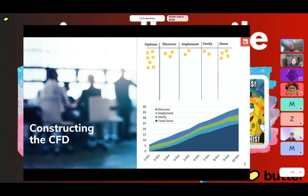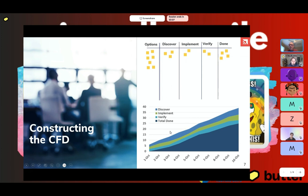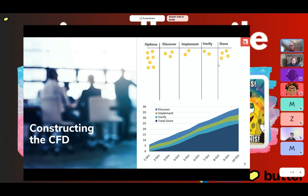Down below you'll see a typical CFD, and there's a relationship between the board you see above and the CFD down below. The columns here directly correspond to the bands in the CFD. Discover corresponds to the discover band; implement is the green line; verify is light blue; and done is down at the bottom. Your x-axis is marked by time, and your y-axis is marked by the quantity of items — those yellow stickies — flowing through the Kanban system.